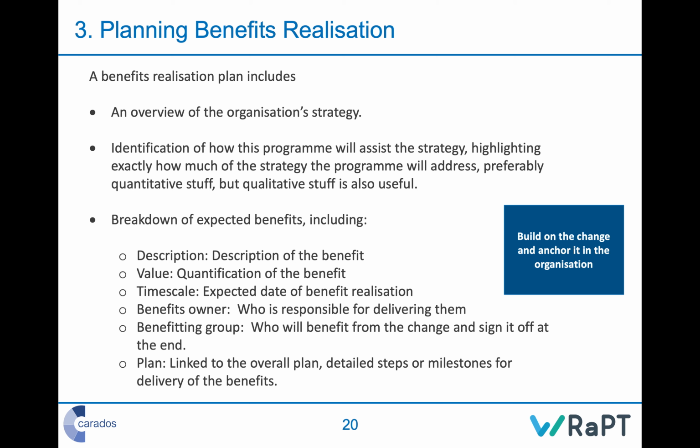So identifying how much this program will assist the strategy, highlighting exactly how much of the strategy the program will address, preferably quantitatively, but you can also do it qualitatively as well, especially if you are bringing in views from patients and from staff, etc. You need to break down the expected benefits and put them into a benefits realisation plan.